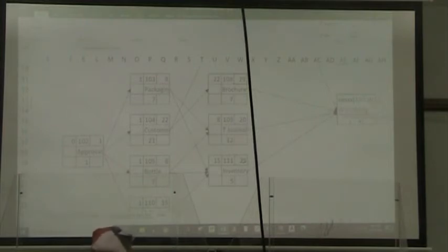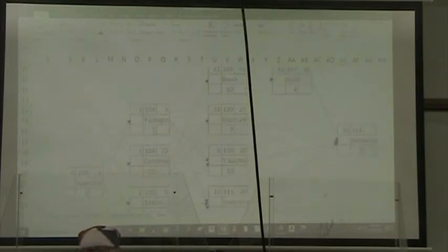All right, right parenthesis. All right, so that gives us 36, not surprisingly, the largest early finish time. And now we just go to equals our early start time of 36 plus our duration.